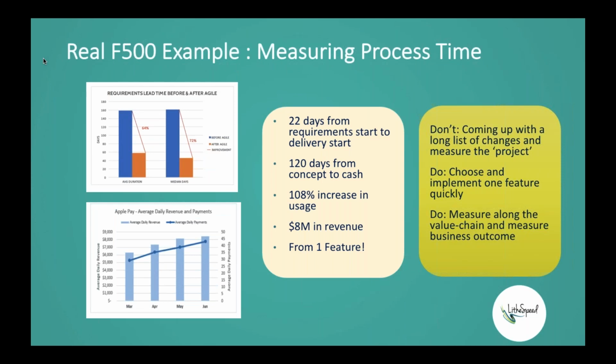So then we focus the delivery army, if you will, on just getting that one thing out the door, right? And instead of batching everything up and trying to do them all and fixing everything way off in the future, perhaps we can deploy one thing immediately. And it turns out one of the big problems that we had in this process, as I said, though, was the business lead time. How long it takes the business to approve and define the problem so that IT could even start on it. Given that that was a problem in the value stream, that was a major bottleneck, we focused some of the measurement attention on that.